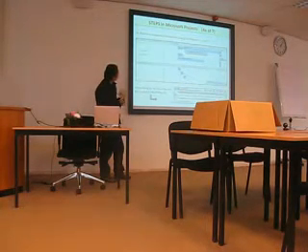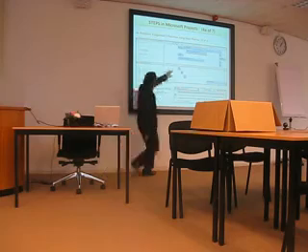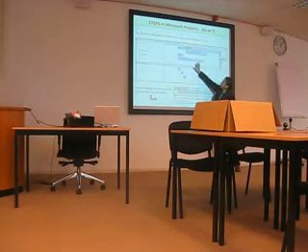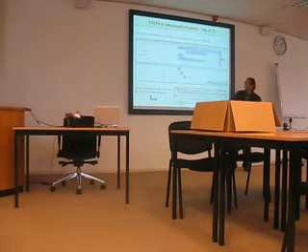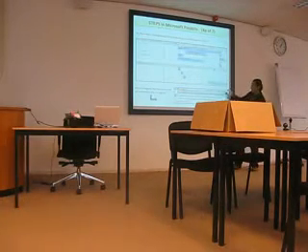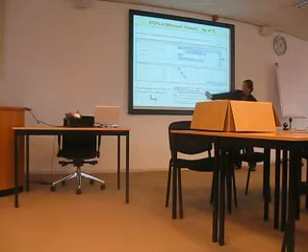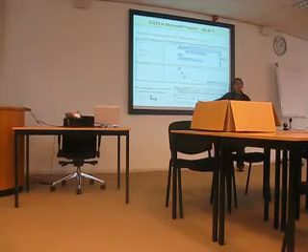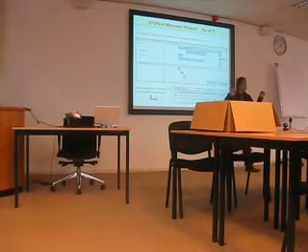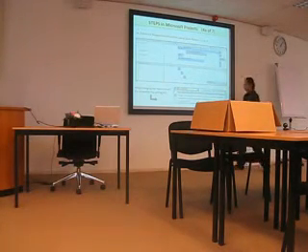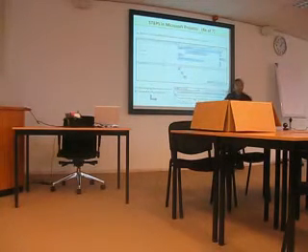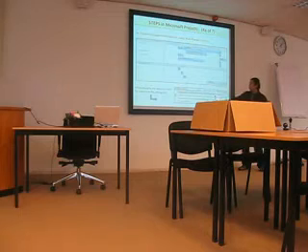It means we have to make changes here. We reduce the working time, or we assign another person or someone else. It will help us a lot. But remember, when you crash the project, you have to remember the setting of this one. You change this one or change this one. If you change the duration, it will extend your project duration. If you choose the second one, it means you just change the total work of that person on the task. So it is very important. Normally, I choose the second one.